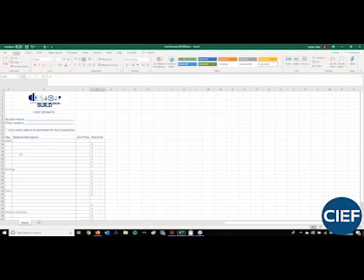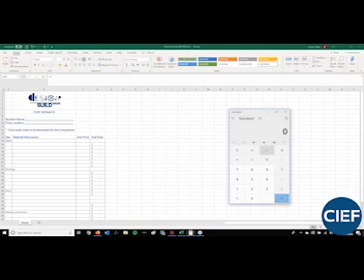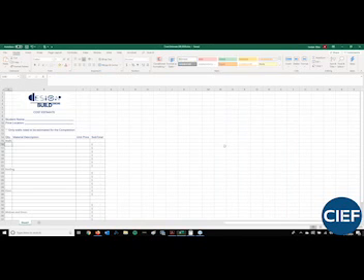Let's say that you need a total of 100 feet of 2x4s in order to complete your structure. We're going to ask that you round up to the next item of length in order to complete the total number of materials that are needed for the structure. You do not need to factor in any percentage of overage, which you would probably do if you were working on this actual building. Again, saying that you need 100 feet of 2x4s, and the average one that you priced out online is an 8-foot length of 2x4, you would need 12.5 pieces. So please round that up to the next quantity. For us, we're saying under the walls, we need 13 2x4 boards that are 8 feet in length.